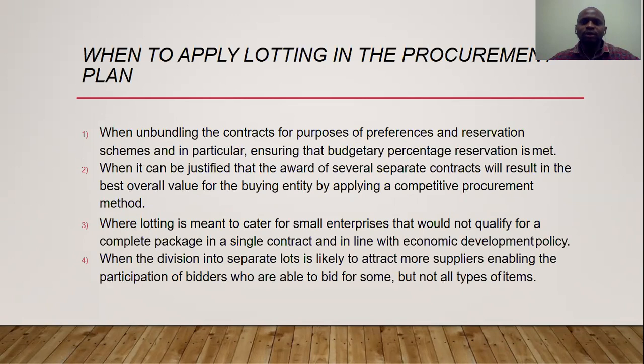So when should you apply lotting in procurement? Number one, when unbundling the contract for purposes of preference and reservation. So if you are setting aside various procurements to a certain particular class of people, then you require to lot them. The other thing is when it can be justified that the award of several separate contracts will result in the best value for the buying entity. So if at the end of the day you are going to be competitive in your procurement method,